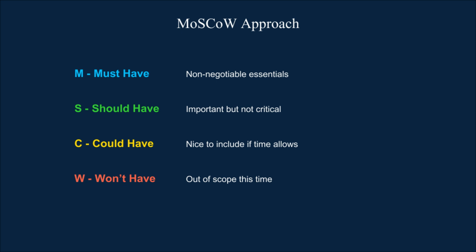Won't have this time. This is what stakeholders often forget. Explicitly agreeing on what is not in scope. For our application, voice-based login may sound futuristic, but if the current release is about delivering core banking functions, this goes into the won't have bucket.